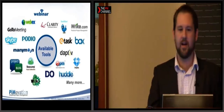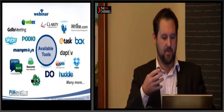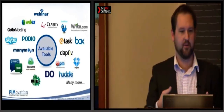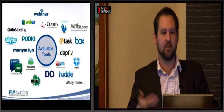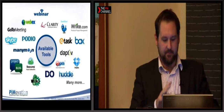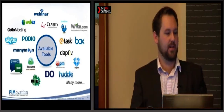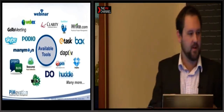Project blogs are another great one where you can create a central repository for your information. Like what Les showed with Google Docs, a project blog is your home for all the information. That's where everything gets filtered back into. There you store all your project documents, all your threaded discussions around change and issues, all your management documents. It's becoming key to this communication style to have that one central place that people can go to. They know all the information will be there, and then you send out bursts from other means via Twitter or your schedule and other tools.